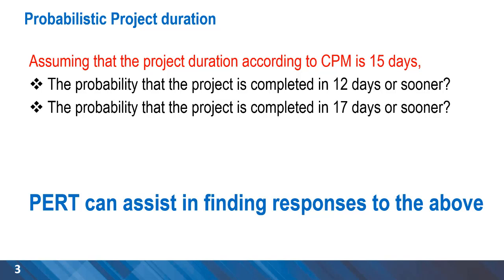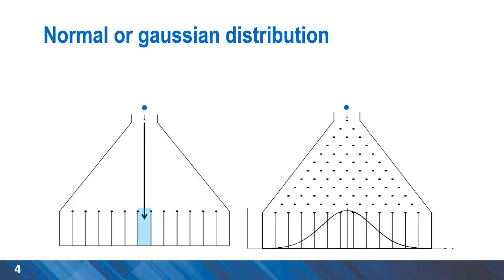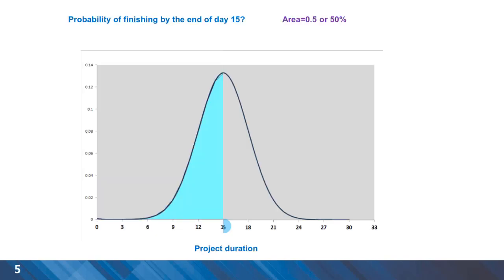For this type of problem, Program Evaluation and Review Technique will be very useful. PERT uses a normal or Gaussian distribution to give us the probability for any event. For example, if 15 days has been calculated as the completion time using CPM, a normal distribution can represent other completion times, and the area under the curve gives us a probability.